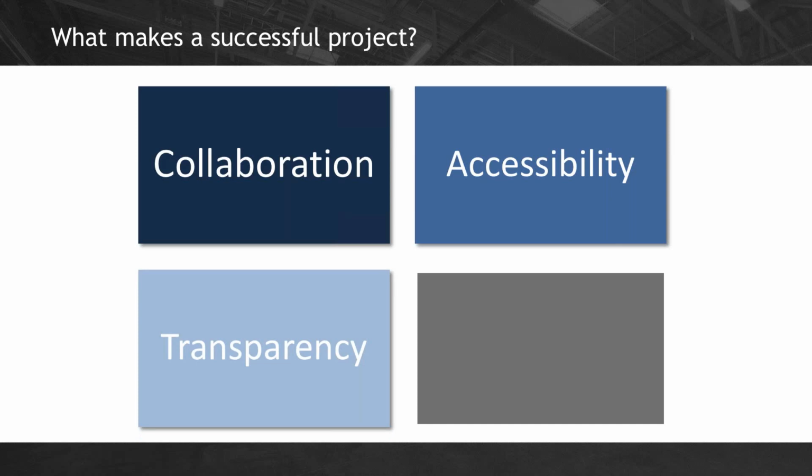When I talk about transparency, it's visibility as well, because BIM Track provides that health of the project. When you assign issues after a coordination meeting and you get together weekly, you really don't have a clear understanding of what's been accomplished with those issues that have been assigned to the team, right? Until you get together on the next coordination meeting and you go over the things that were addressed and the things that weren't, that's usually when you find out. But BIM Track allows you to really measure the progress of that at any point in time. And it's interesting from a psychological perspective because people tend to be a little bit more proactive because there is a project-wide visibility into the health of the project.